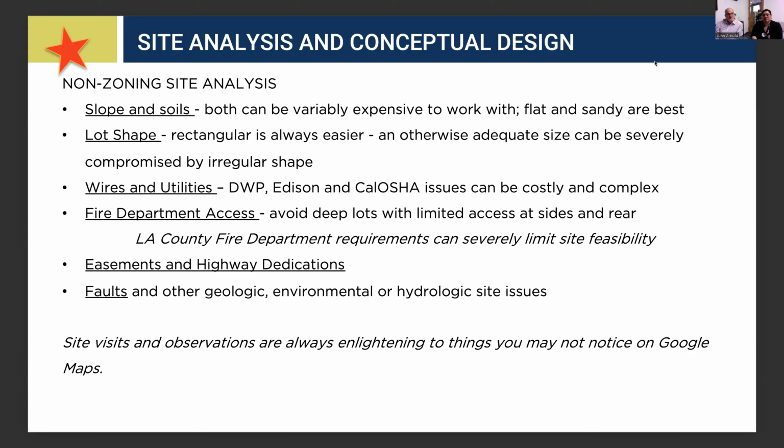Lastly, faults and other geologic, environmental, or hydrologic site issues. Along with the soils report that you get, maybe the dirt is contaminated, and you're going to have to take out probably two to three feet of the dirt, or maybe even more, and have new soil brought in.